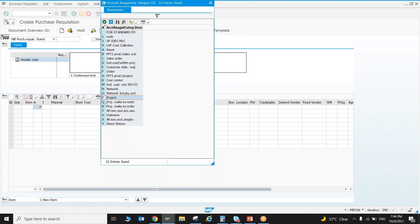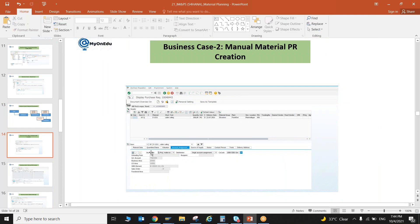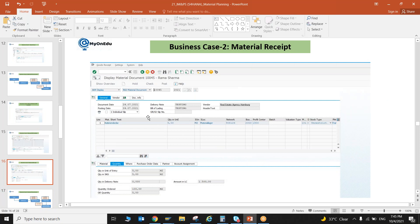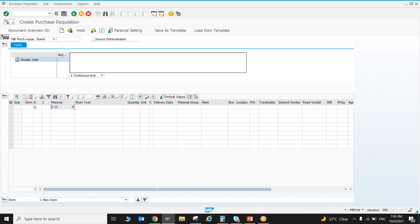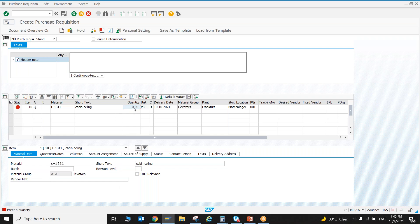In transaction ME51N, select account assignment category Q for stock. Enter the material number E-13311, press Enter. System asks for plant: 1300. Enter quantity 10. Since I selected Q, the system asks for a WBS element — if I had selected N it would ask for a network. The account assignment object depends on the account assignment category selected. Enter the WBS element and proceed.